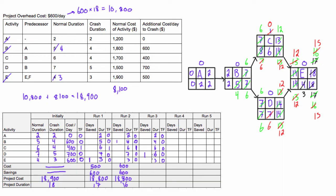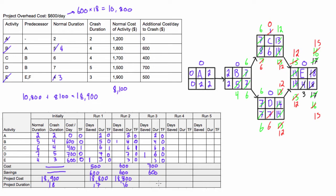Now, let's look at this. What did we do? We cut one day out of D. So the cost to do that for D was $700. So we spent $700 crashing it. We saved 600. Remember, our daily cost is 600 per day. And because we knocked a day off, we got to save that 600 bucks. So now we're back up to the original cost of $18,900. And our duration has been reduced to 15 days.